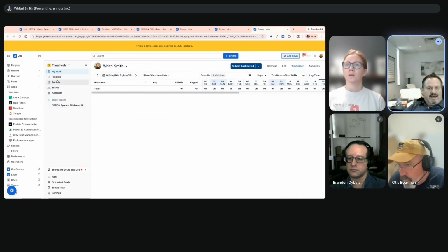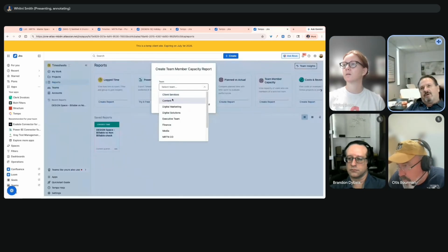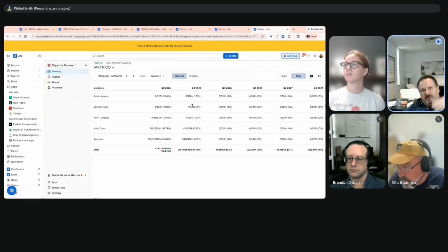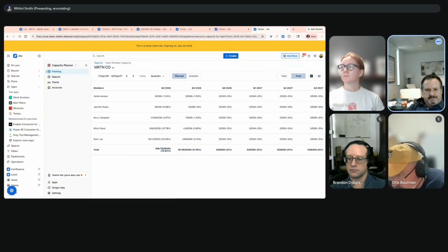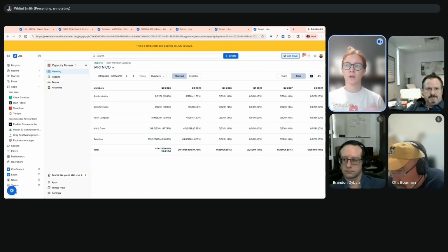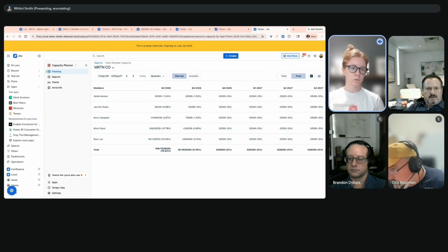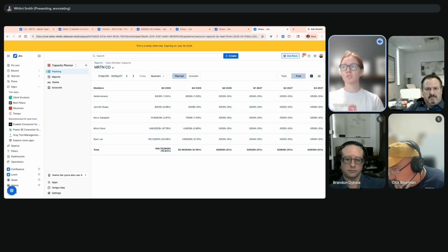So I'd like to have a way to look at all the projects and see how people are doing, or even from an individual's perspective, all the projects they're working on and how they're doing against their allocated time. Yeah. So you can allocate that time based on that workload and then the percentage that somebody is going into that. So I put everybody at like a 90% on 40-hour load, but the capacity for what they can contribute to the project, there are ways to define that per individual. This was just a report.